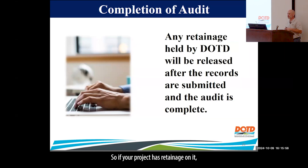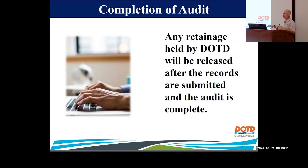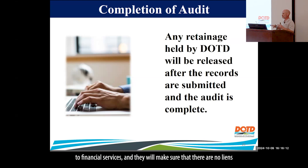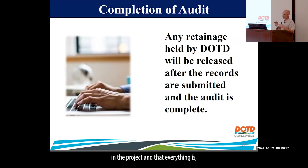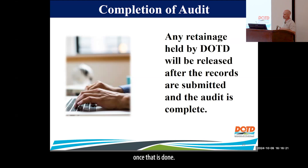If your project has retainage, project retainage will not be released until the final audit is complete and I close out that final estimate. Once that's done, I will release the retainage to financial services and they will make sure there are no liens on the project and that everything is submitted before releasing the retainage.